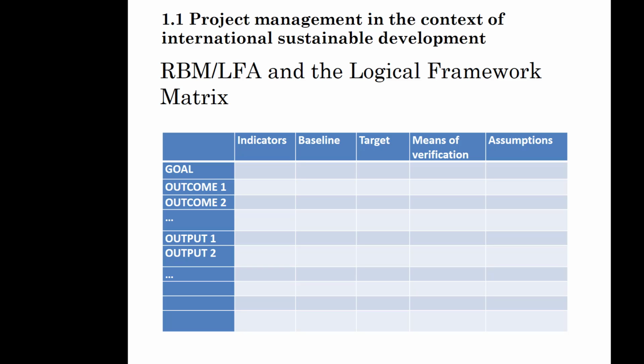A crude example would be, let's say, policymakers will read the research results. If they do not, the factor is considered to be out of the scope of the project to influence, meaning that the project has delivered the results, but the policymakers are not reading them, so they are not applying the policy changes that we have foreseen, and so results will not be happening.